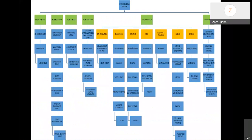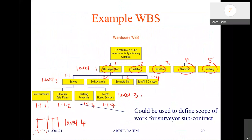How detailed should the WBS be — up to Level 4 or further? You can go further, but the further you go the more difficulty you have getting all information to update. Just imagine if you update every day without information — you simply cannot update accurately. It may reflect inaccurate progress even if work is completed, because the information is not there. That will give the client opportunity to ask more questions.